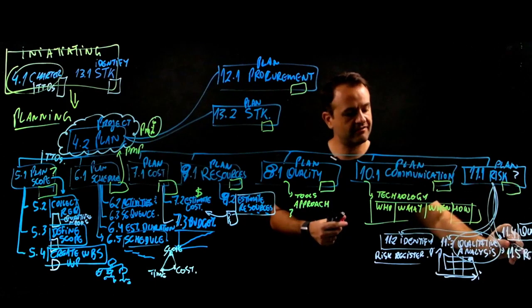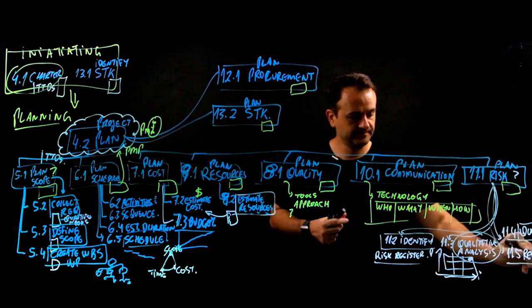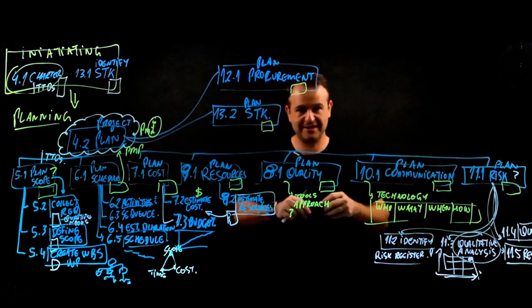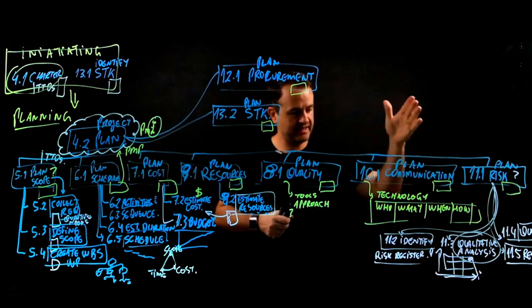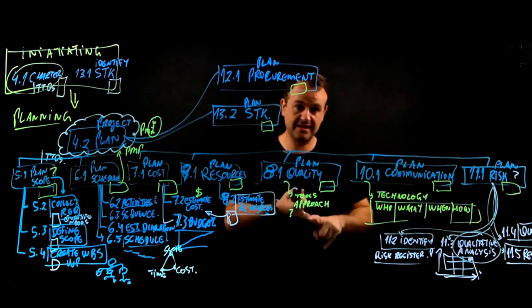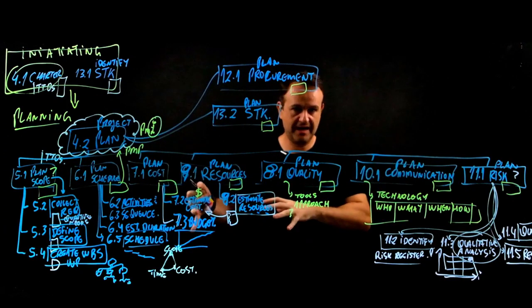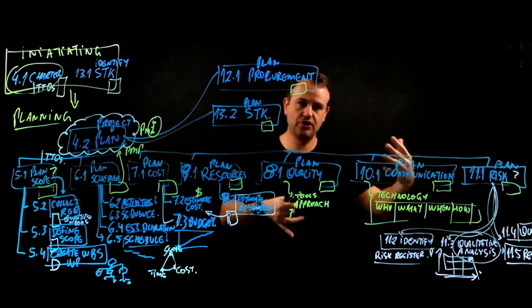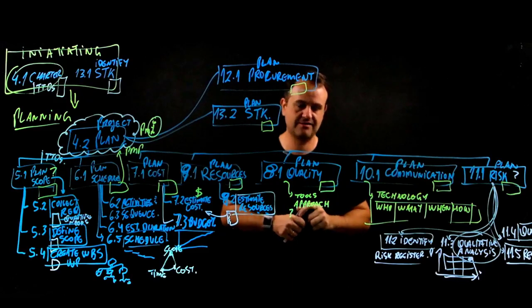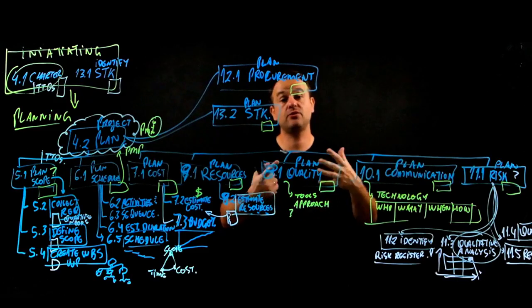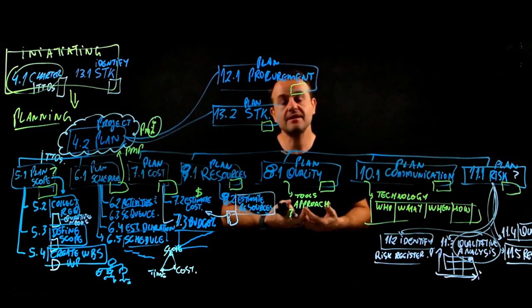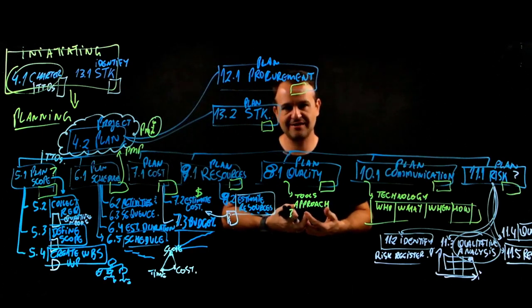So in 11.5, create risk response. I'm going to describe risk responses in detail in another video, as I mentioned to you. But we can accept the risk, we can mitigate the risk, reduce the impact, reduce the probability, we can get insurance, transfer the risk, for example. We can try to avoid the risk, making changes to the project plan, so that we can eliminate those risks.